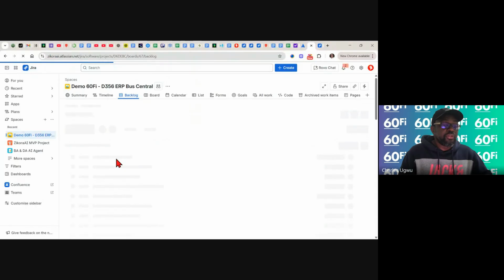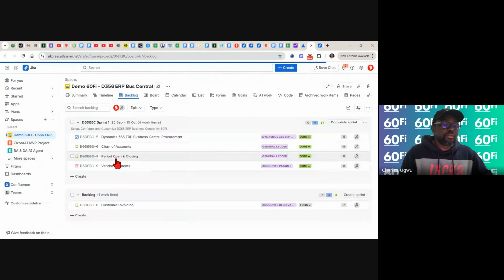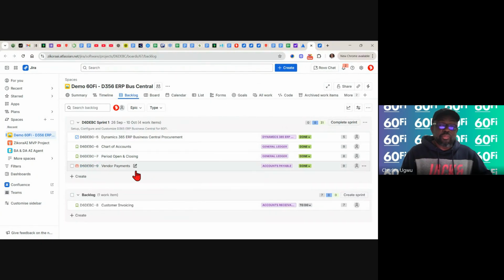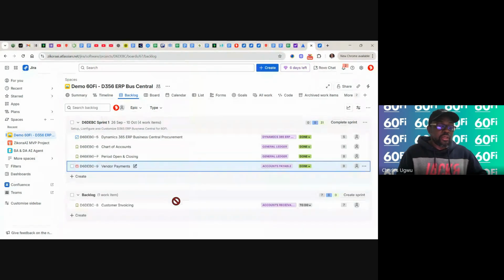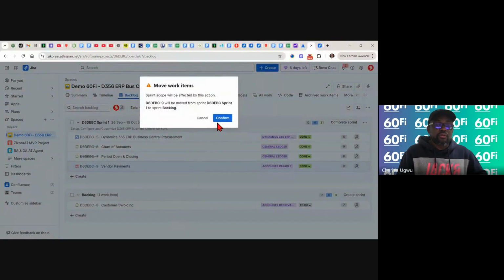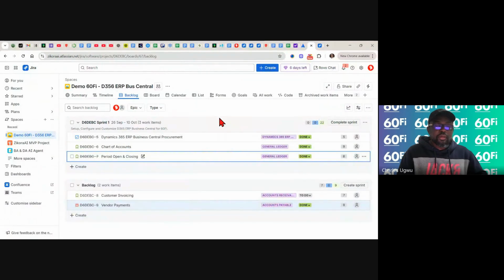It shouldn't be showing this user story. You can see it's no longer a user story, it's a bug, because during the testing, we find out there is a defect. So we need to move it back. During the next work, the developers need to fix it. Confirmed. So during our next work, we have a bug and the work remaining.